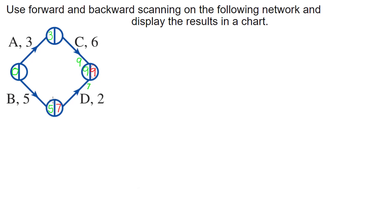The earliest I can start D is minute five, but I can wait until minute seven to start D. For C: nine minus six gives me three. Again, we have two paths meeting at a single node, so we write results on the path. Continuing back: three minus three gives zero for the A path, and seven minus five gives two for the B path.